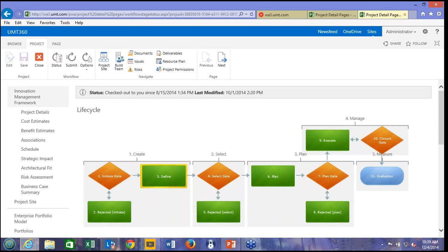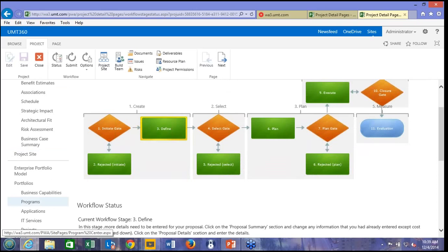We can also start to circle back once we've completed the project. We'll have forecast costs of the projects to start to derive estimating accuracy at different levels or different stages within our planning process. It's rich information that's going to help us improve our planning processes over time. So what I'm going to do, because I'm pressed on time, is now focus more on the execute stage. So I'm going to pick up